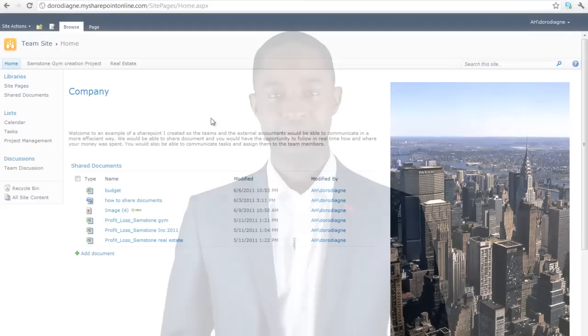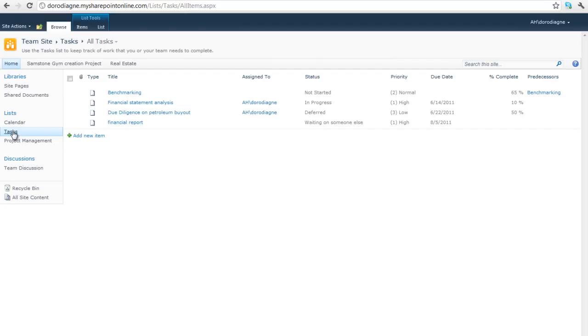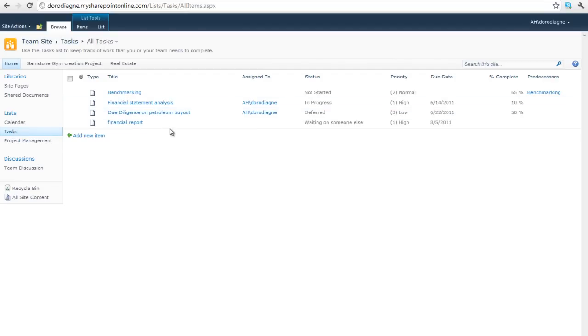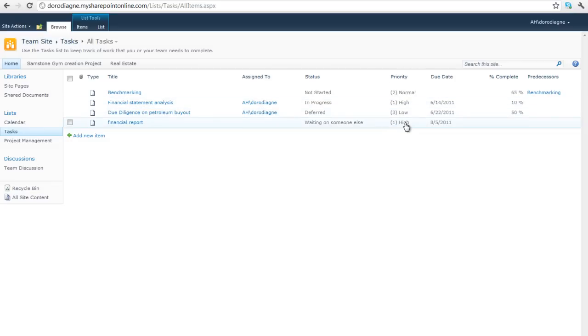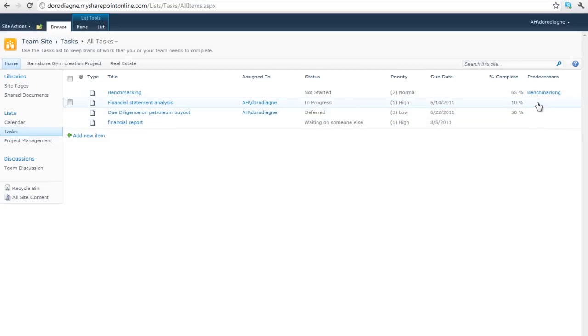Now let's get on to assigning tasks. I'm going to explain how to assign tasks to each team member. Go on to the left panel and click on task. You will then see all the tasks available for all the team members. You can see the status of each task, the level of priority, the due date and the predecessor of each task.